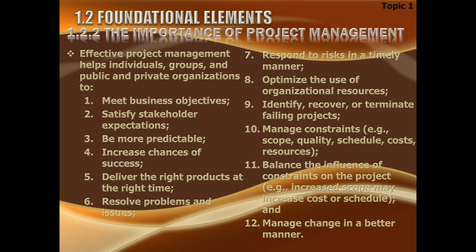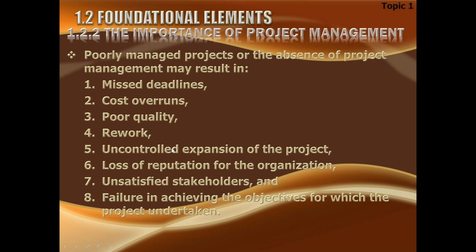But if you can economize, if you can save time, money, or other things, then it is being efficient. Poorly managed projects or the absence of project management may result in missed deadlines, cost overruns, poor quality, rework, uncontrolled expansion of the project, which is called scope creep, loss of reputation, unsatisfied stakeholders, and failure of achieving the objective.